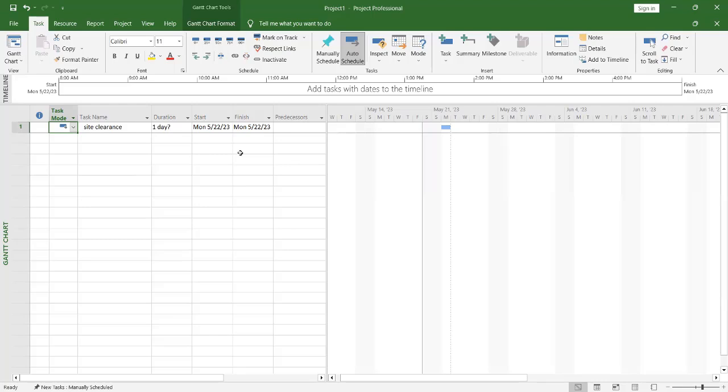Our working hours is from 8 o'clock to 12 o'clock, and then we have a 1 hour break, and then you have from 1 to 5. So all those things depend on the calendar that you need to create as a project manager. You know how your company works, you know how many hours you want your staff to work. So all those things is what you are going to set yourself.